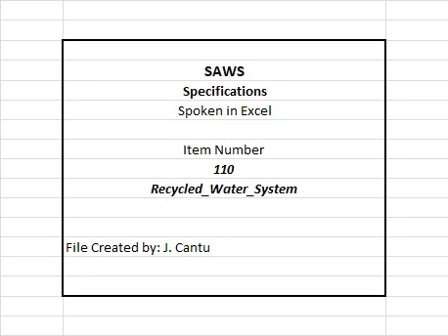3. Shop drawings. A. Catalog data sheets for all materials confirming pipe, fittings, and other materials conform to requirements of this specification. B. Pipe supplier information. Submit company name and contact number. C. Details of all piping system components confirming that the pipe and fittings conform to the specified requirements. D. The contractor shall submit shop drawings of pipe, fittings, gaskets, hardware, flanges, appurtenances, and special details sufficient to demonstrate compliance with these specifications and applicable pipe installation specification.